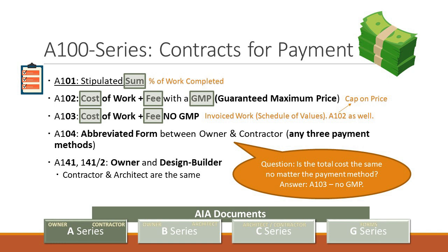So in the beginning of a project, the contractor has a fairly substantial outlay of cash versus the actual work being done. You've got to rent a trailer, porta potties, your crane, and get your people mobilized, and this is all before you've dug a hole.